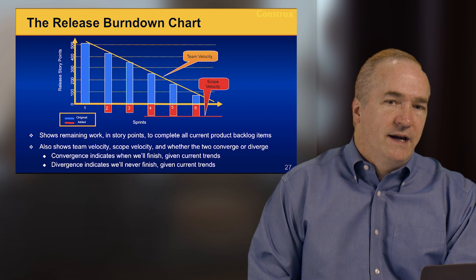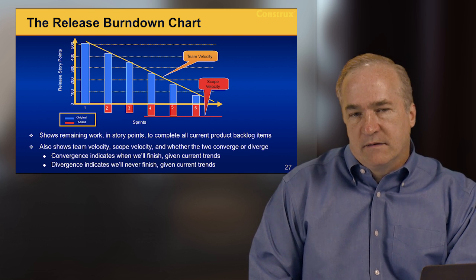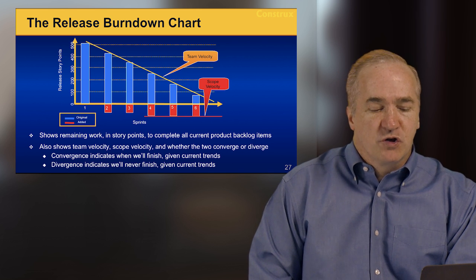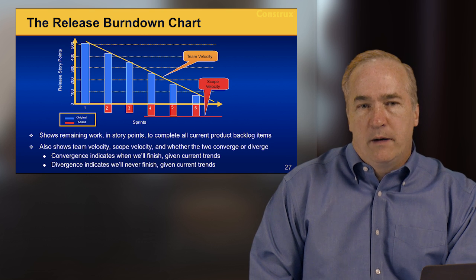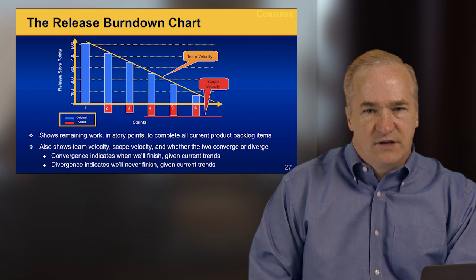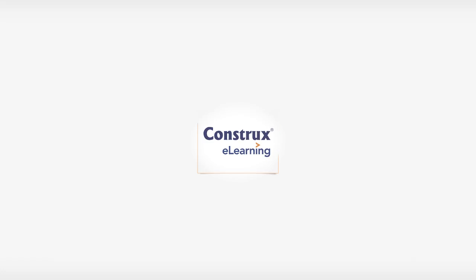The beauty of this chart, again, is we can estimate all we want to in terms of our ability to get deliverables done over time or our team velocity, but the chart will show you what the real number is. So a good product owner updates his chart at the end of each sprint and can continually forecast and commit based upon the latest possible data.